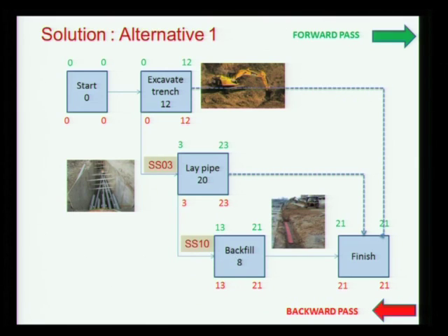Okay, before you even do the finish, you cannot have a dangling activity. People try to connect these, but it just doesn't work. The network representation does not represent the project, you will have all kinds of values floating around and it will not be meaningful. So they say yes, we have not done a finish relationship.